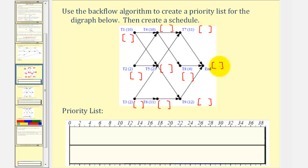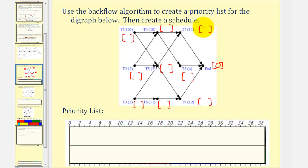We're going to work away from the end to the beginning, listing the critical times from each vertex. We start at the end, which would have a critical time of zero. Notice how task seven, eight, and nine lead to the end. The critical time for task seven would be eleven hours, the time it takes to complete that task. The critical time for task eight would be four, and the critical time for task nine would be twelve.